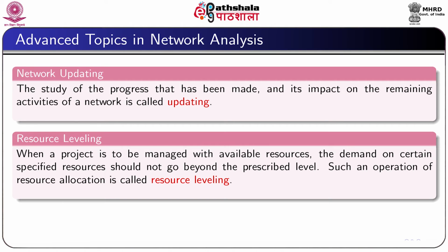Before I conclude this module as well as this chapter, let me introduce some advanced topics in network analysis. Network updating. Updating means study of the progress that has been made and its impact on the remaining activities. The time estimates made before may be incorrect. A particular activity may take less or more time. So, by modifying estimates of time on various activities, the remaining network can be redrawn. This is known as network updating.